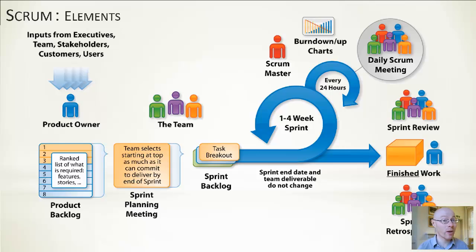These are just simply a way of tracking our progress during the sprint, so that if there's 4 or 5 items of functionality, then we can track, are we on target to complete those items of functionality within, for example, the 2 weeks we have available. Over on the right hand side then, we've got some finished work. So after every sprint, we will produce something that is complete, that can be given to the client.